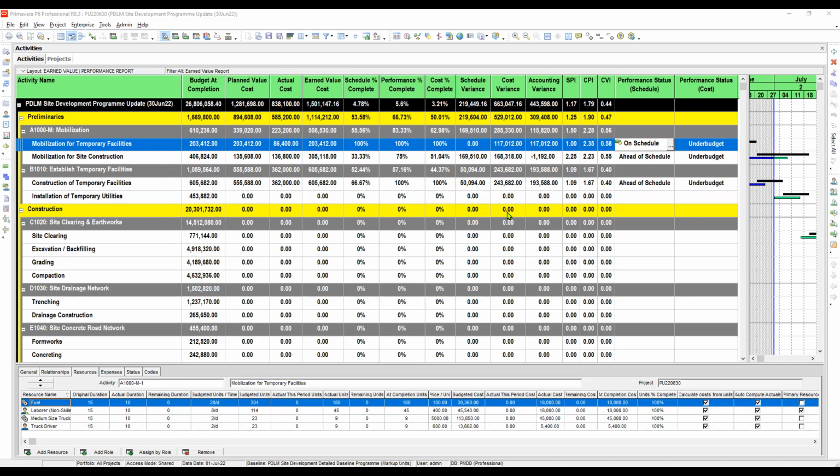That is good progress. When we say behind schedule, that means what we have earned, what we are entitled to earn, is less than what is planned. So if we planned 1 million for this month and our computed earnings are only 500,000, we are behind schedule. That is the meaning.